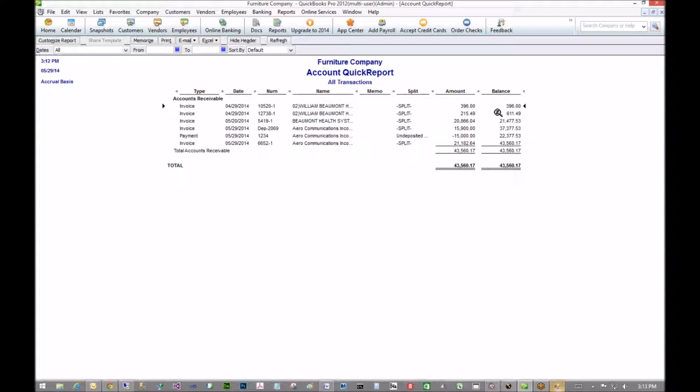Those are applied directly in QuickBooks, correct? You said yesterday that expenses are applied directly in QuickBooks. The bills, right. So remember that the bills go in as bills. And if you're using the WIP, they're going to go into WIP until you do your customer invoice, and then they become COGS on the job. Expenses, anything that is not related to COGS, the overhead expenses, are done directly in QuickBooks.